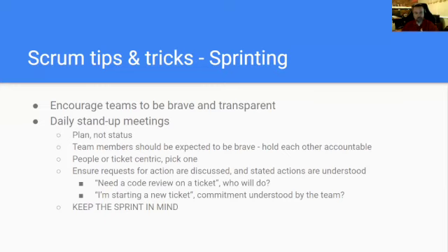People are ticket-centric, right? So a lot of times for a Kanban team, rather than Bob saying I'm doing this and John saying I'm doing this and Susie saying I'm doing this, some Kanban teams like to work their board right to left, right? So the farther a ticket is across the board, the more valuable their time is spent getting that complete, if possible, versus starting something brand new. Scrum teams can kind of do the same thing.